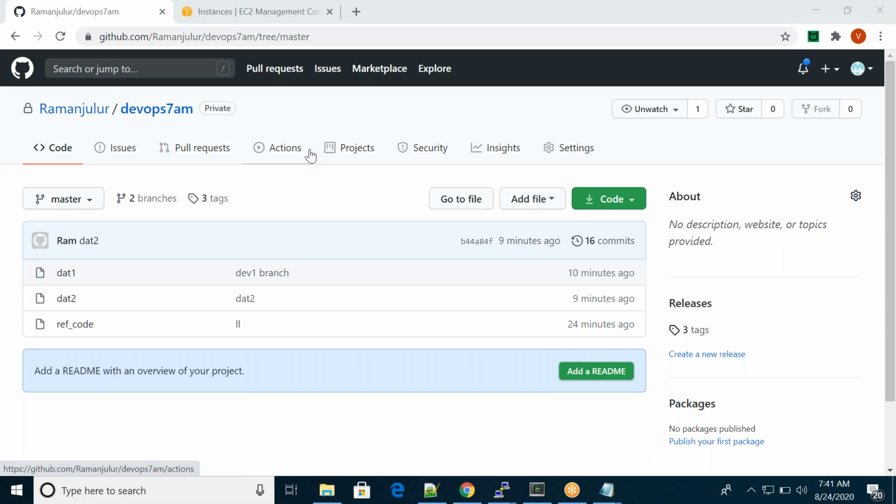Yeah, you're right. So they will follow the sprint cycle. Sprint means 10 working days. At the beginning of the sprint, the managers or the business analysts will assign the tasks to individuals. They will create the tasks in Jira. Jira is one of the ticketing tools, or we can say a task tracking tool. So we can get the tasks in Jira. They assign the tasks at the beginning of the sprint to individuals, and the individuals write the code, whatever it may be.